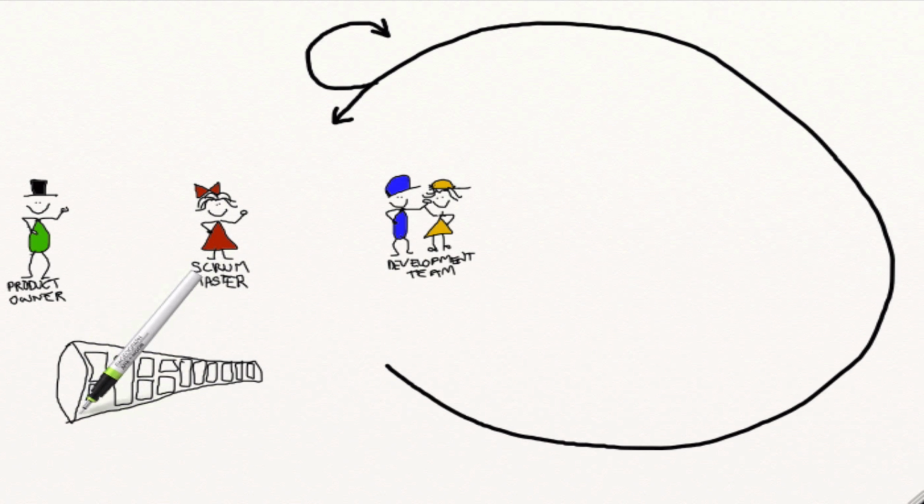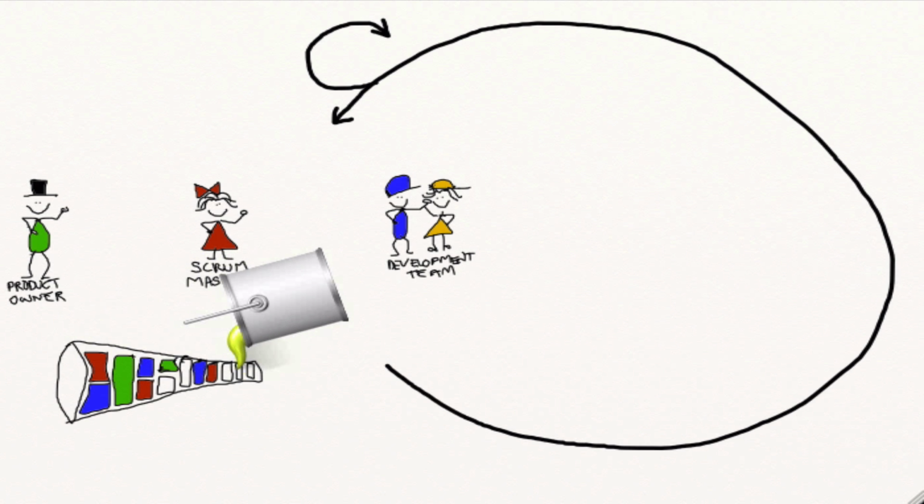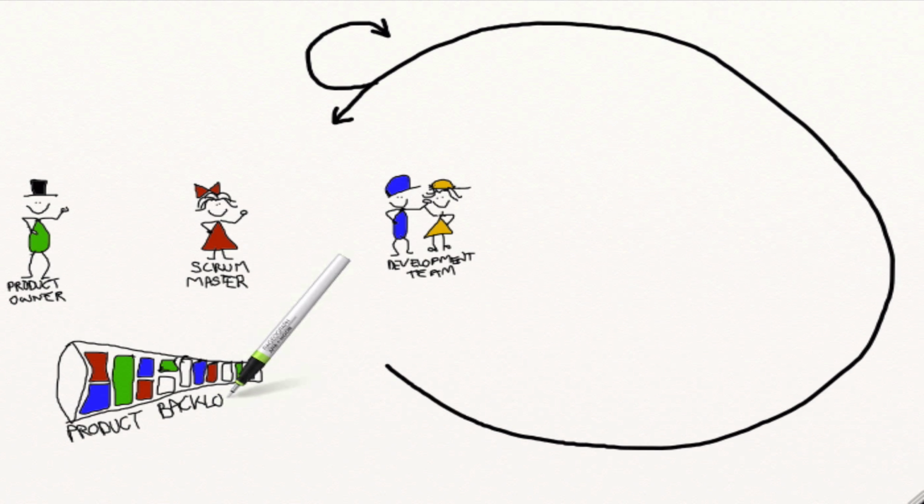Rush there. The product backlog is an ordered list of all known requirements, which in Scrum are called product backlog items. Sometimes they're abbreviated PBIs. The product backlog is visible to anyone. And like a funnel, there's a fixed amount of stuff that can come through. So prioritization is really important, as well as the quality of the description of each of the product backlog items.